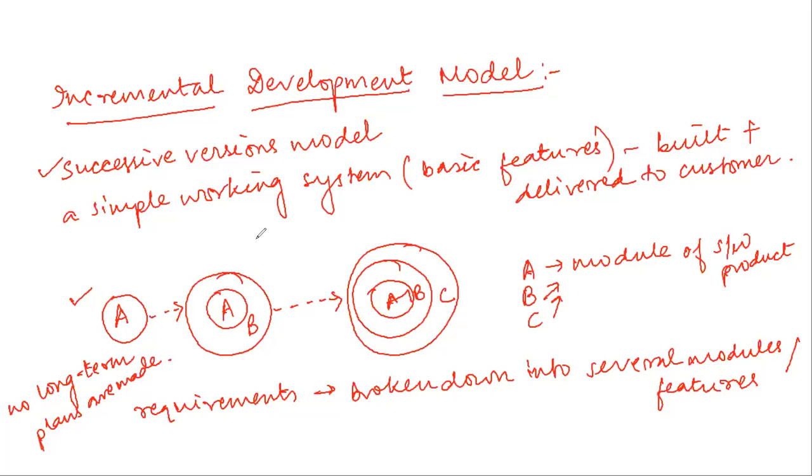After the requirement gathering and specification is done, the requirement is split into several versions. Starting with the core version of the software, the development team starts making it. In each successive increment, the next version is constructed using an iterative waterfall model of development, and each of these versions is deployed to the customer. So after the last version has been